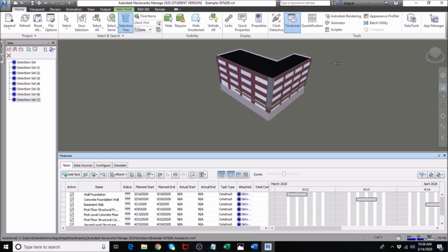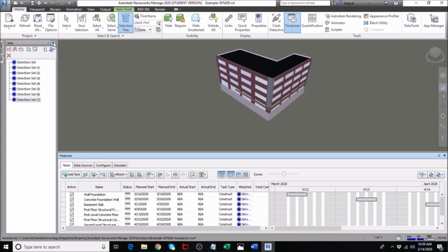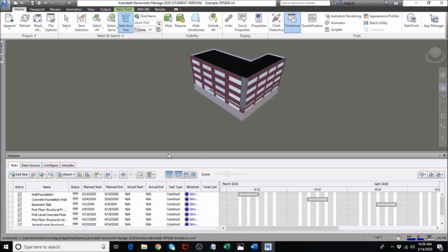What you do is you need to load first the 3D drawing that has the .rvt extension file. Once you have that, you have to activate the timeliner again, and then once you have that, it will give you the detail additional view at the bottom of the drawing.